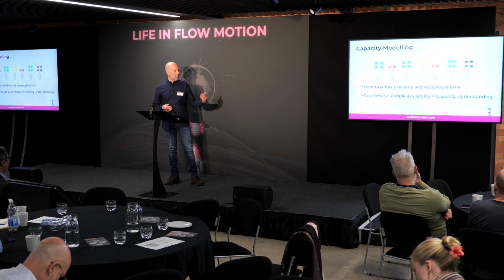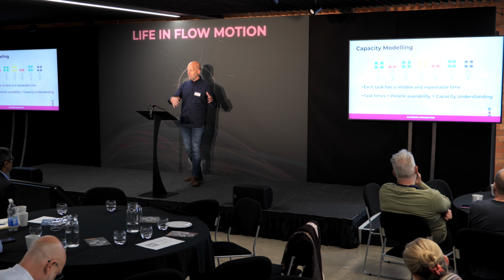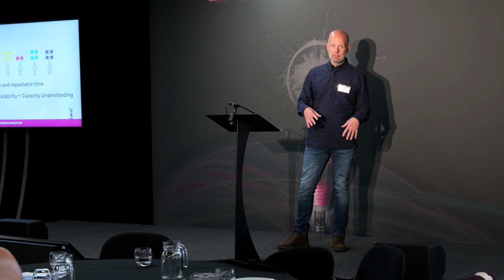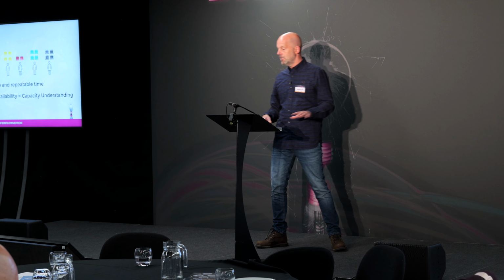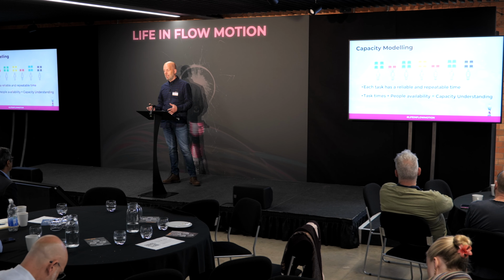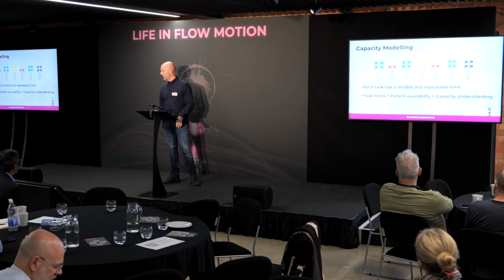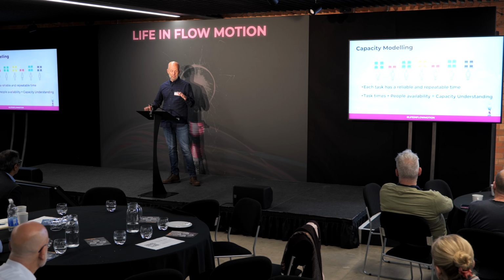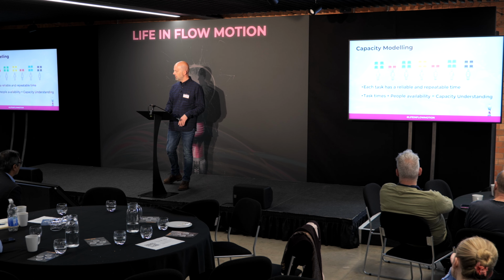But when you have got reliable and repeatable data for your constraint, which is your people, then you can start to feed that into a capacity model. So this is the holy grail of working in a lab. If you've got the times, you've got your people availability, then you can have your capacity. Your capacity is your people, you can just plug it in. And then you can start to effectively plan things like stability studies and validation, so you can level load across the year rather than having the huge peaks and troughs that can occur.